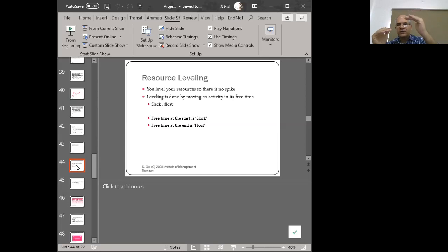My workload needs to be brought down, and the other person who was only doing 10% of the work, their workload needs to be increased so that there's a balance, that me and the other person are doing an equal amount of work, right? So if there's a 90-hour task and I'm given 80 hours and the other person is given 10 hours, clearly there's a mismatch.